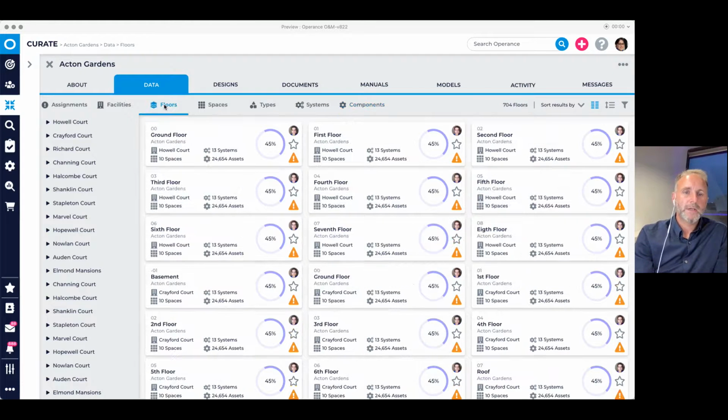You see, if you're looking at a common data environment as a potential golden thread solution, these are not much more than just a simple filing system with information stored in files annotated to what they're relevant to. It could be an architectural file or a mechanical, electrical, and plumbing file, for instance. But one of the key recommendations for the development of a golden thread is to hold information at the component level. And this makes absolute sense.